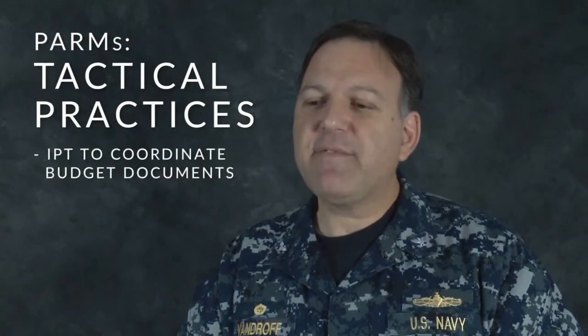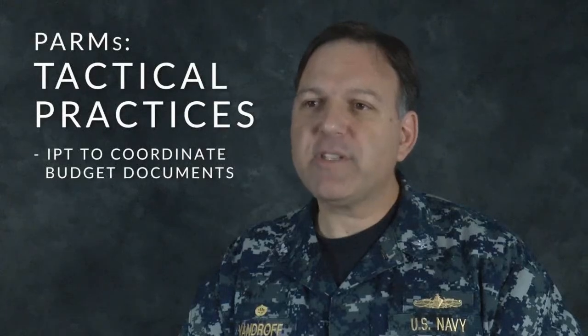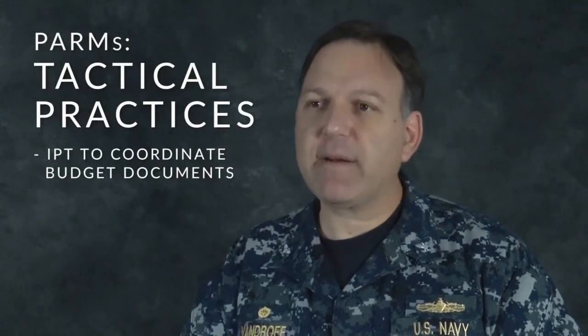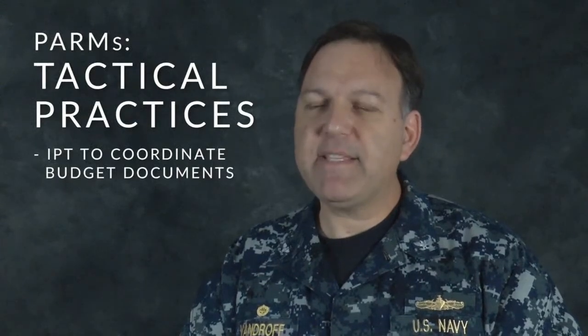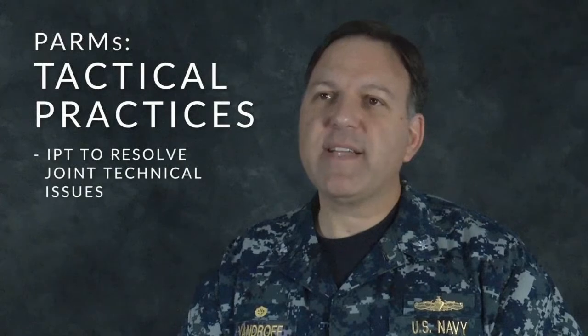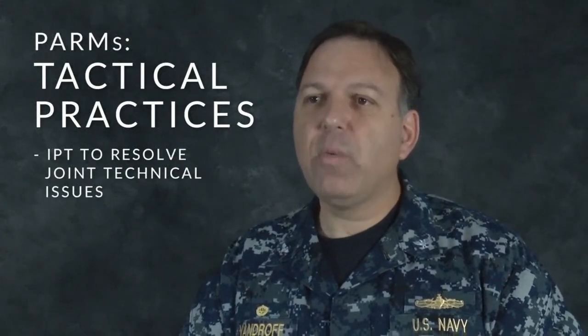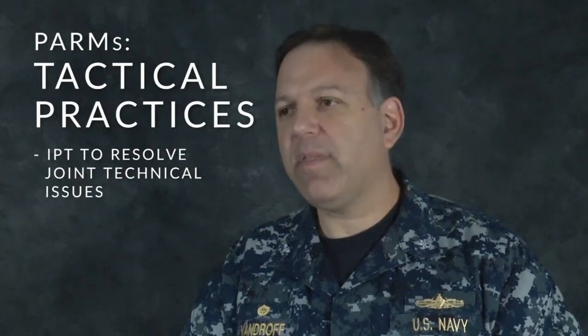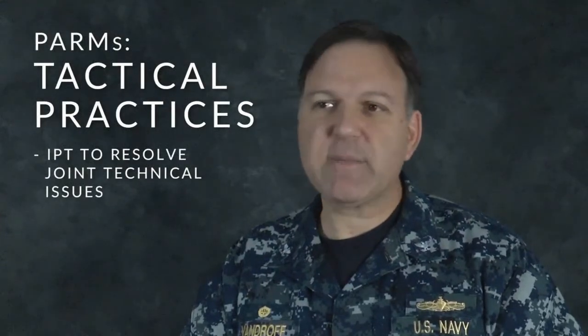You have to have an IPT for budget documents. Your budget documents plus the PARM's budget documents have to match. They have to be complementary to each other. You need to have an IPT for the development of that. You need to have an IPT to resolve joint technical issues, because some technical issues will only be able to be solved by the platform or the lead program and its PARMs working together.